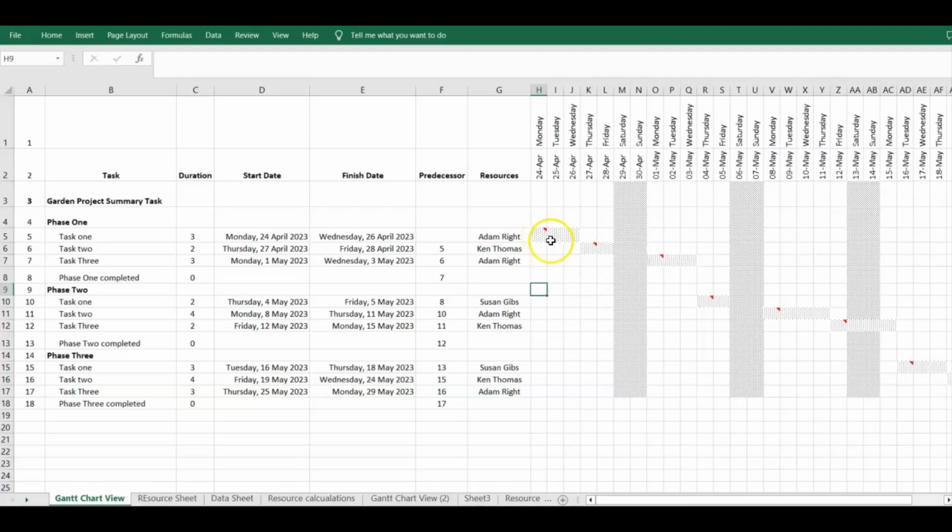For instance, now I have resources Adam Wright, John Smith, and a crane, which is equipment. So you're going to insert these notes that tell you what the resources are with respect to the different tasks. That way you can go back and make sure that where you have overlapping parallel tasks running, you don't have the same resource, which could cause over allocation of resources.